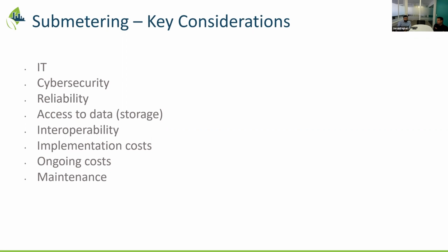So from a change control perspective and assessment perspective, IT is a key stakeholder and should be involved right from the beginning, from the time the project charter is developed and from the time the design begins. This way, IT knows the project and IT can give as much support as possible. And this can avoid any confrontation or difficult times when IT is involved from an implementation phase.